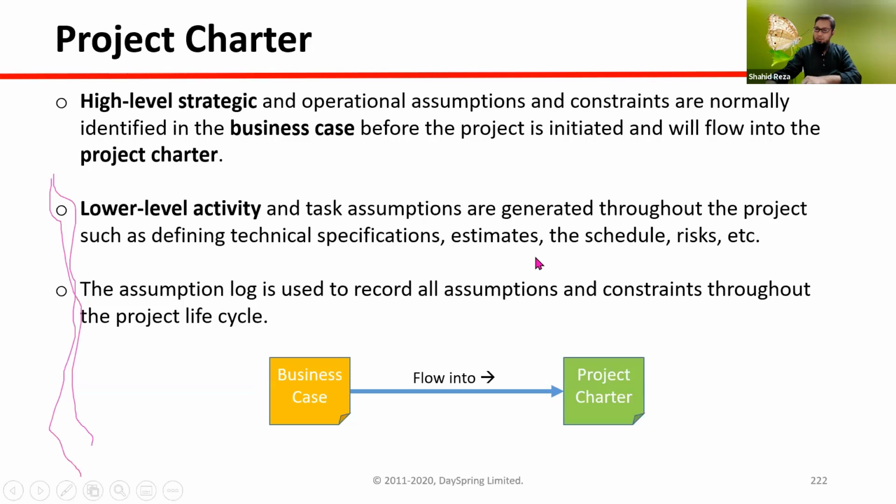In some organizations, especially some projects which are donor funded, they actually publish the project charter in printed format, fully colorful. What is the budget, what are the outcome deliverables, what are the main components or modules of the project, how much is the budget, and who are the sponsors, ADB, World Bank or government, and what is the share of everyone when they are sponsoring. With all this, they sometimes print one or two colorful pages and share them with the public. This is open for everyone to know about the project.